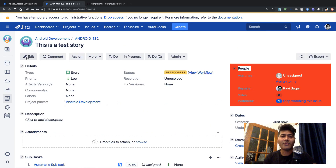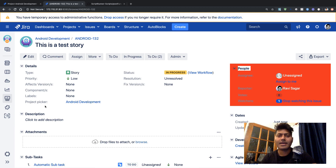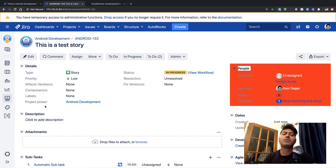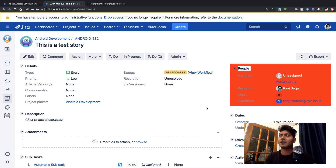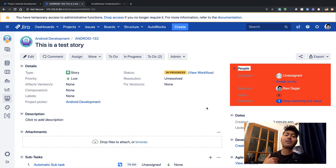But I have a requirement - I want that in my issue, if I have a custom field and a specific value is set in that custom field, only then create this subtask. So let us say if you are doing onboarding and we have to create multiple activities, but we only want to do it when we have an approval or when we have some value checked in a select list, only then create it. For this example, I will create a select list of multiple type where we have multiple options, and if one of those options is selected then create the subtask, otherwise ignore the post function.